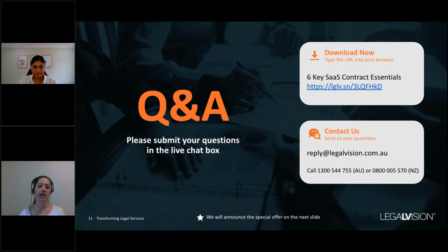And what this would be is a contract where you set out your software development agreement, and then you say that every time we do a new project, it will be under a separate statement of work or a separate purchase order. Each time you do a new project, you can agree on what those fees and services will be, but those same terms and conditions will apply. That makes it a lot easier for these ongoing arrangements, because you don't need to get a new contract signed each time. You can just agree on the commercials, and you know that the other contract will apply to that situation.